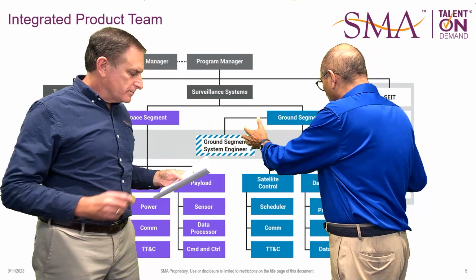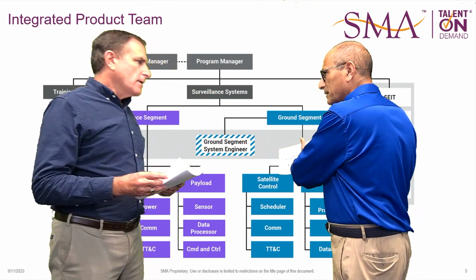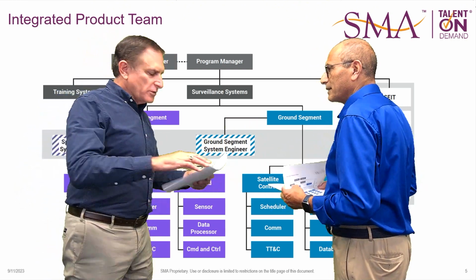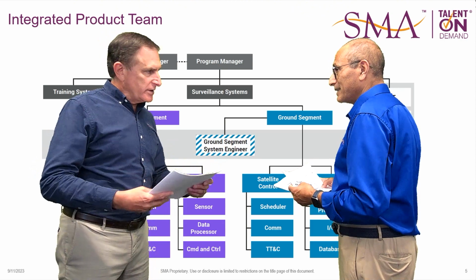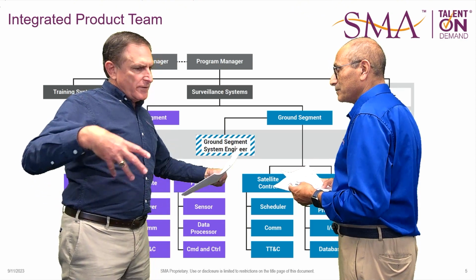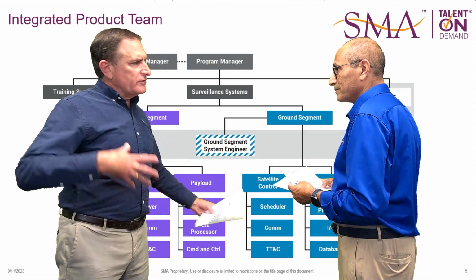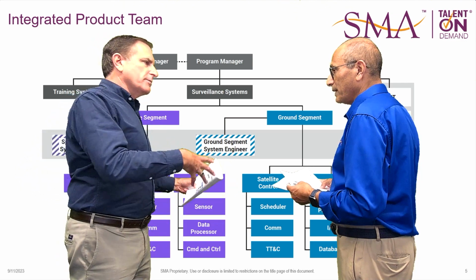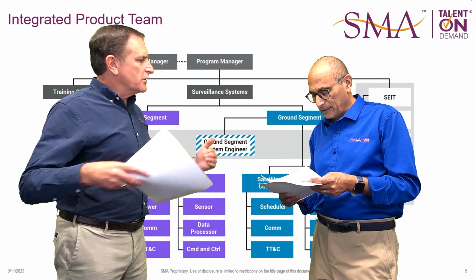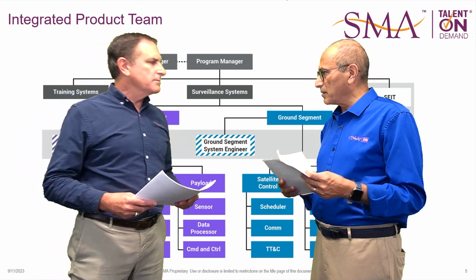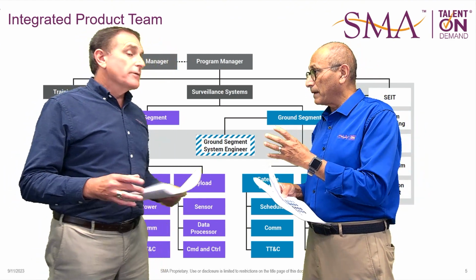So if you have individual products, how do the products come together to create a system? That's where your system architecture comes in. But also, that's where the IMS becomes really important, because as you complete those products, then you look at the activities around integration, which is integrating those products into the final assembly. And is there a separate IPT for integration? There is, actually. Got it.